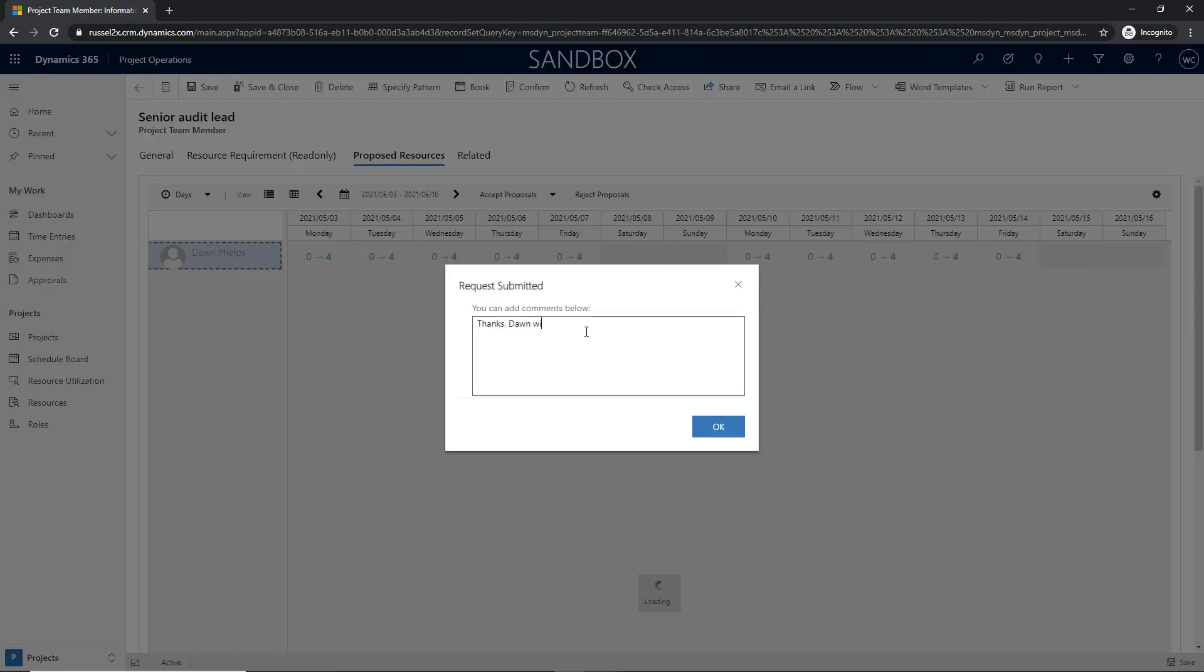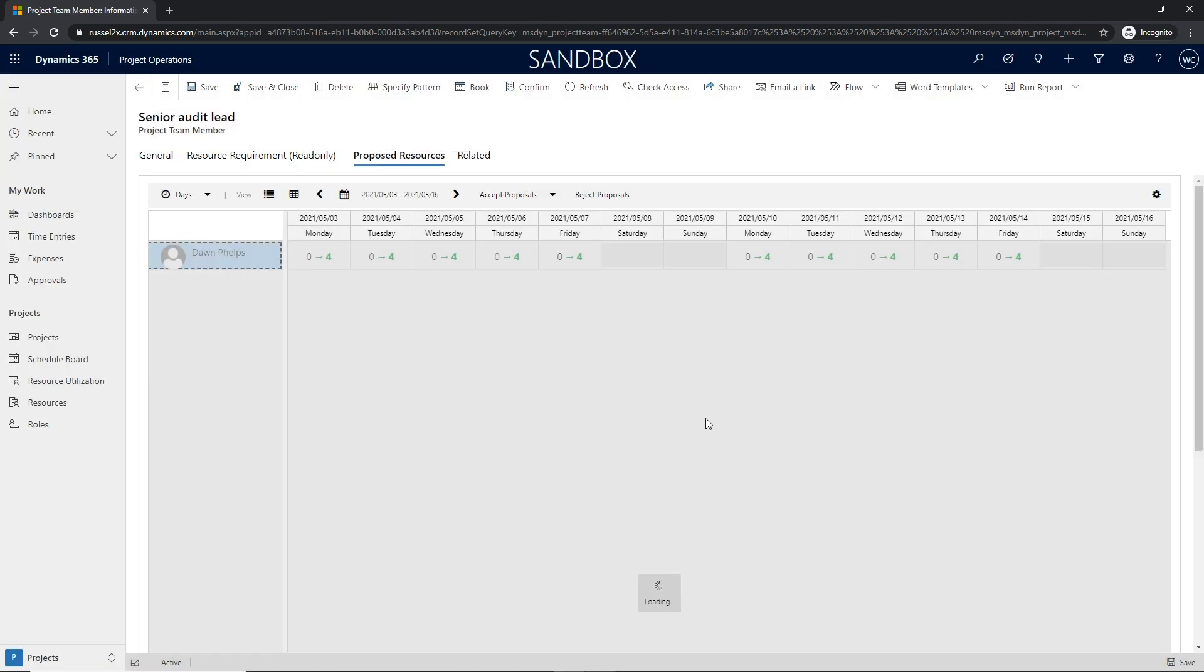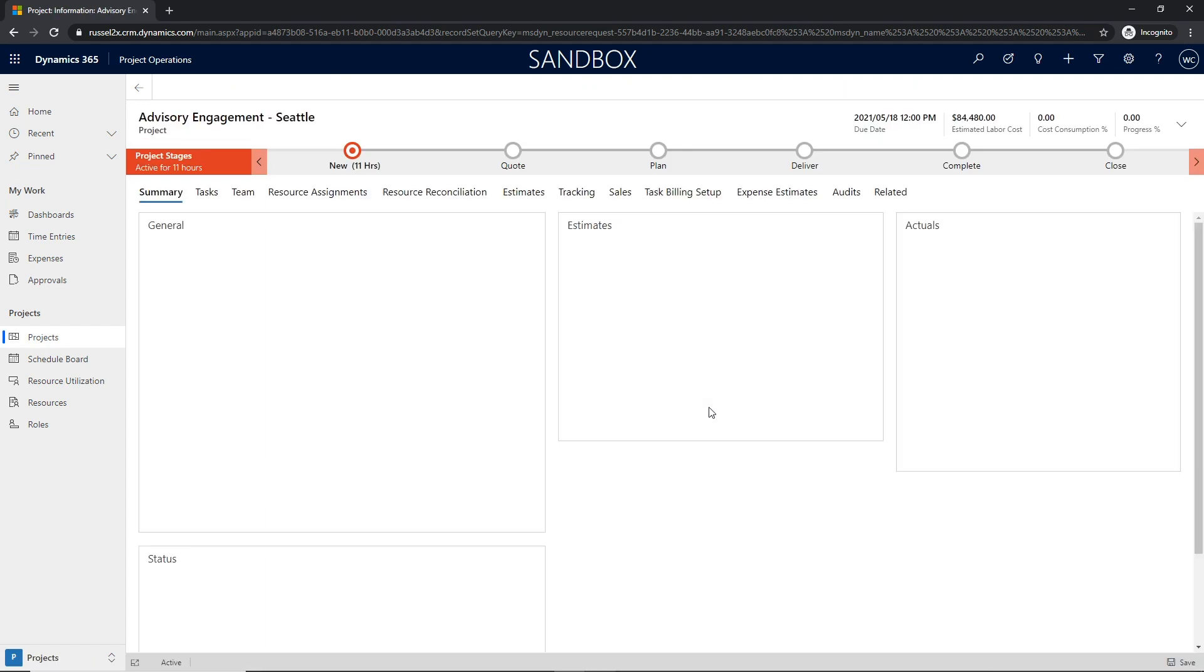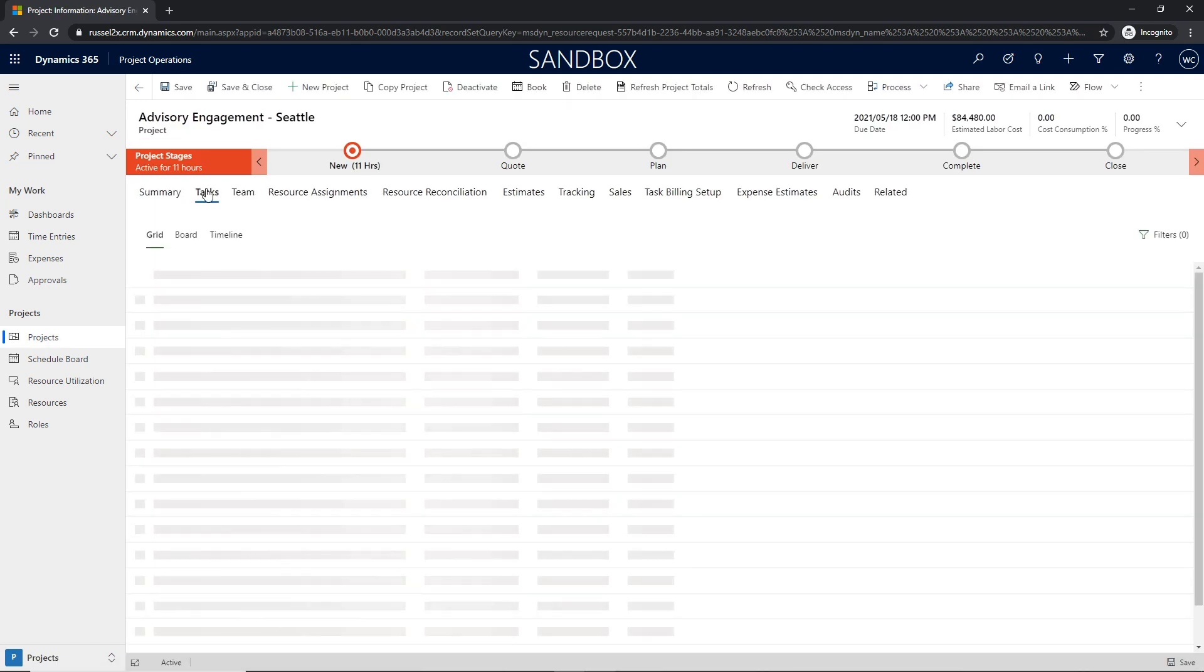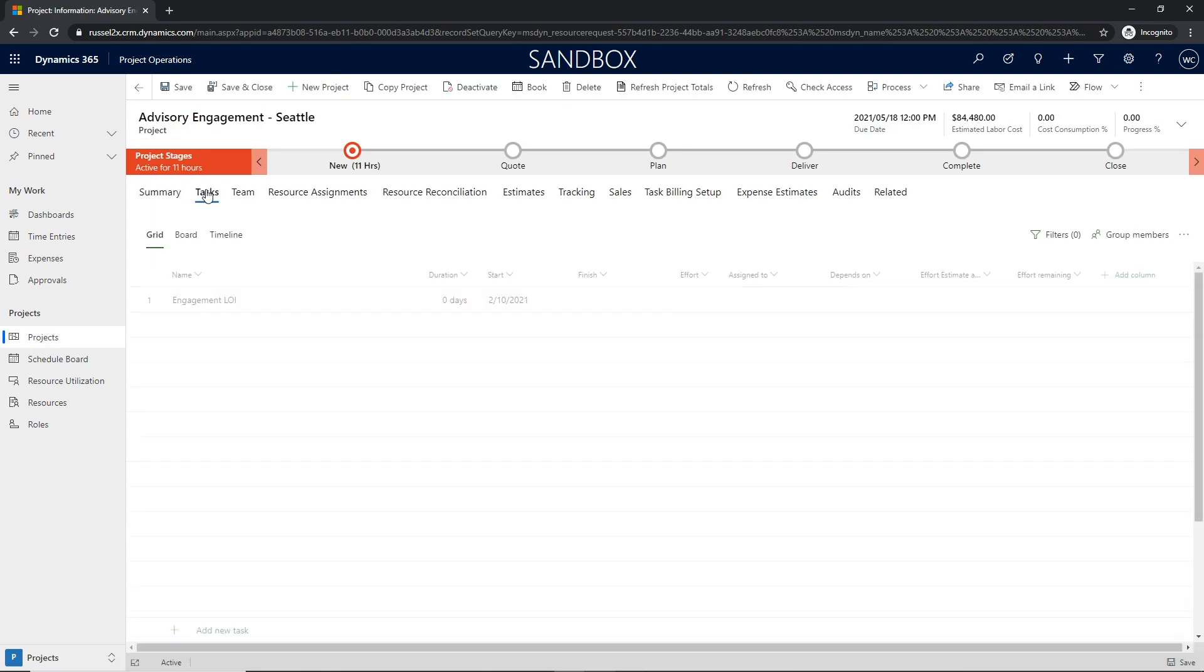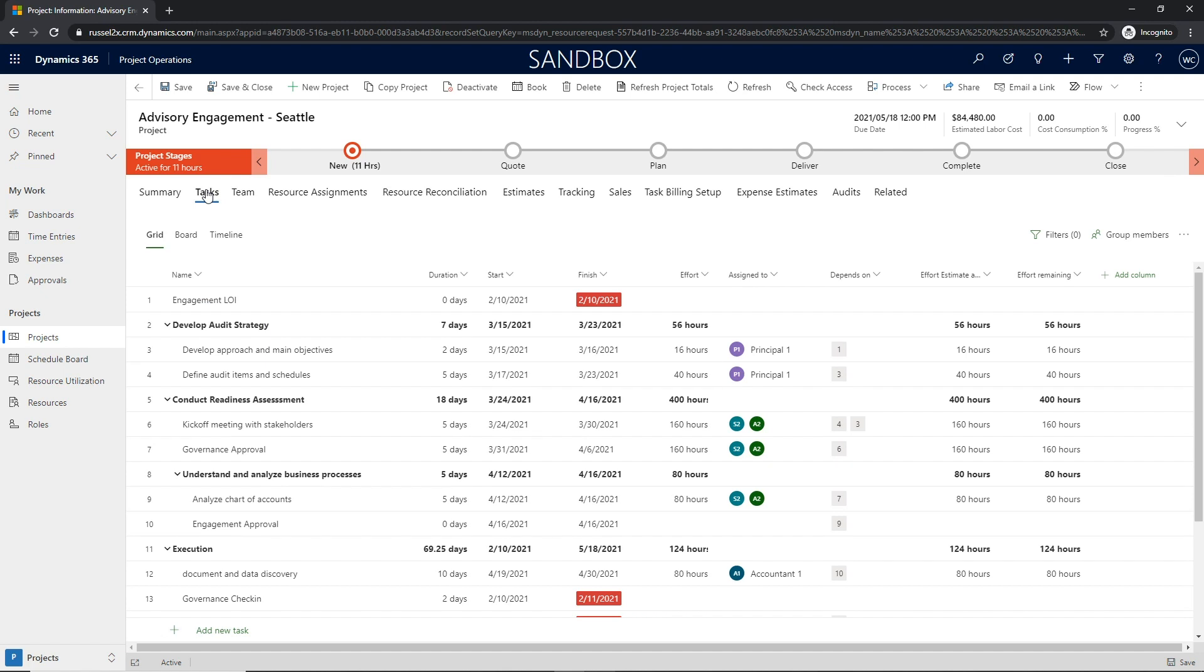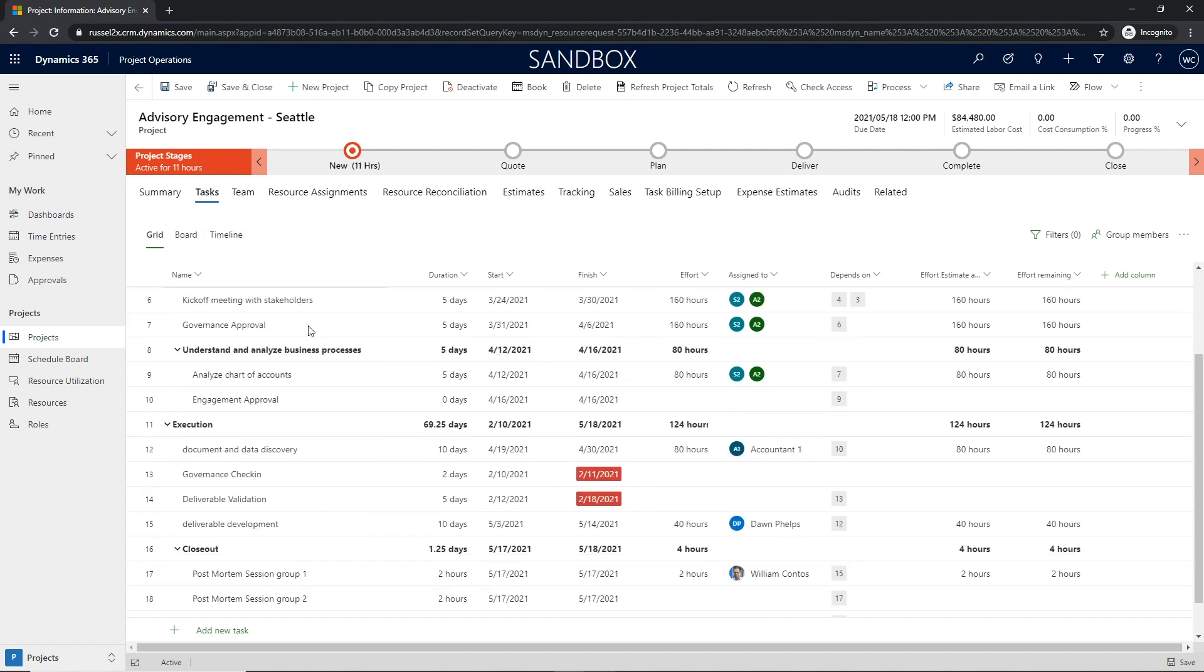Once that resource has been accepted by the project manager, that resource will be added to the project team. They will replace the generic resource assigned to any tasks in the work breakdown structure and the resource requirement can then be completed.